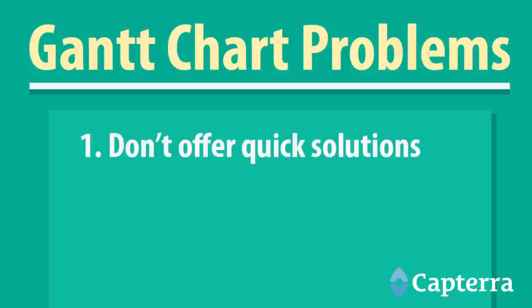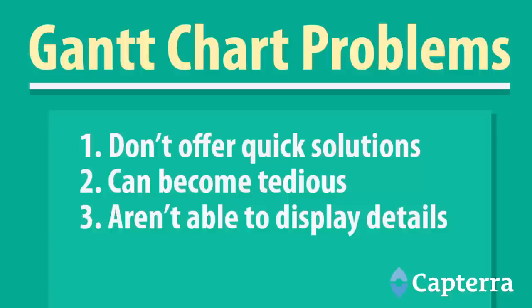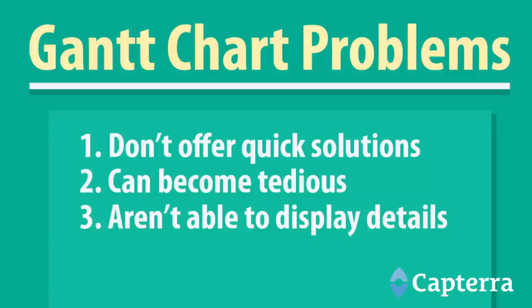Of course, there are objections to Gantt charts. These are the major three. One, as an inflexible project management system, Gantt charts do not offer quick solutions to addressing problems with an unforeseen event. Two, it can become tedious to consistently update the chart or expect teammates to keep their personal charts updated. And three, Gantt charts are largely used to display how far along a project will be at a certain point in time — there's not much space on the typical Gantt chart to elaborate on task expectations or even purpose.